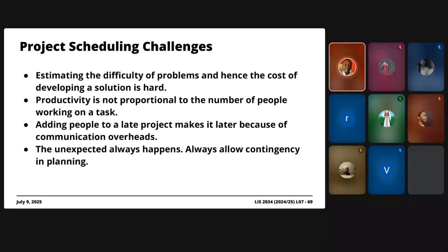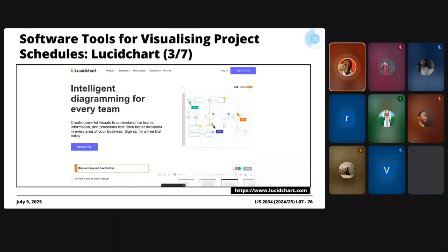If you come up with 20 tasks, for each and every one of those tasks you identify the start date, and how long you anticipate it's going to take for you to complete that task. In essence, you have got to estimate.